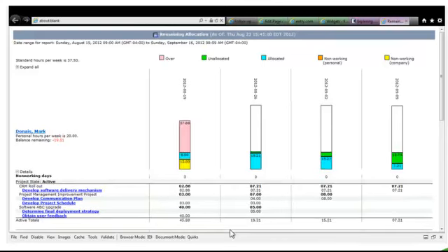In our individual resource remaining allocation report, we can compare the amount of time that has been allocated for the individual for work, for example 37.5 hours, and we can subtract the allocated time from it and provide a difference which will help us in the allocation of new work for this individual.